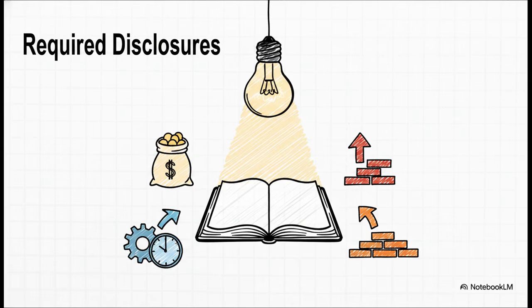And to ensure companies aren't hiding these structural tricks, remember that transparency is our ultimate weapon against fraud. AS7 requires some very specific disclosures. The entity has to openly disclose the contract revenue recognized, the exact method used for the stage of completion, the amount of advances received, and all the nitty-gritty details regarding retentions and work in progress. This is what keeps investors fully informed.